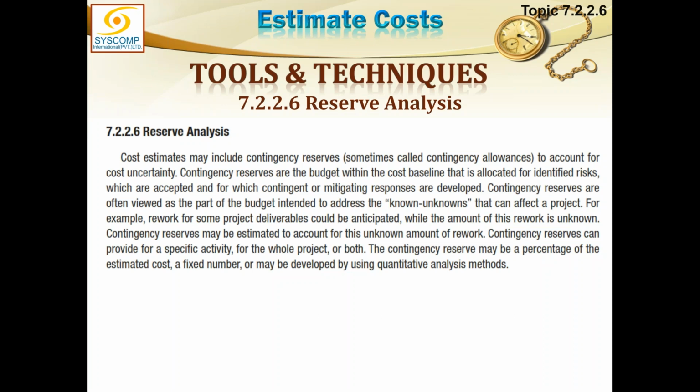Like if I have to deal with something which is in very small units, like I have to buy sand. Sand could be something which is in very small parts. So I can always say that I need 10% extra sand. That could be accommodated.